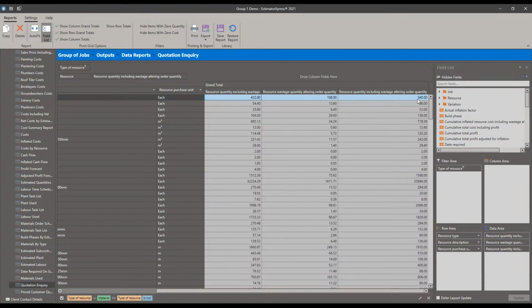So that's where that bulk purchasing, or bulk negotiation, starts coming in. A merchant wants to secure a sale of 540 bags of cement with you. They can do it right there. They know that you're going to need that many. They can say they can provide that or not. They can make an agreement to that, and you can negotiate yourself a price for that full amount across both jobs, because you know you're going to need them.